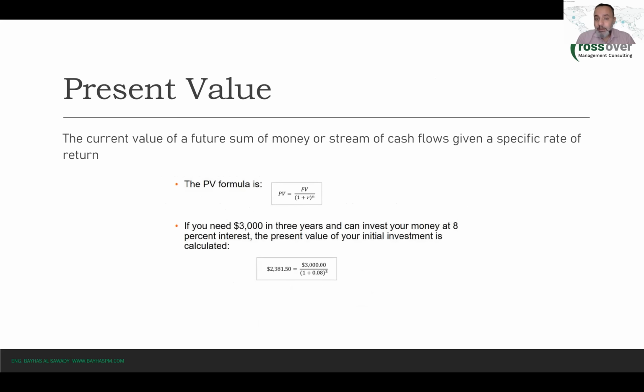No, the ROI is calculated again. The benefit is when you finish the project, because you don't get the net profit until you finish the project, right? So building, for instance, the tower will cost us $1 million, but the net profit of selling the tower is expected to be, for instance, 300,000 US dollars, then this is the ROI. The ROI is 30%. Okay.